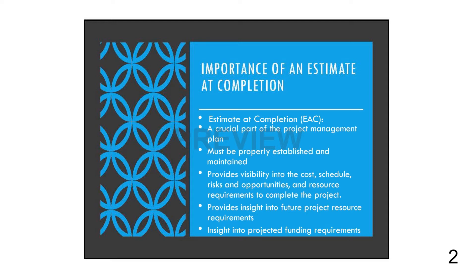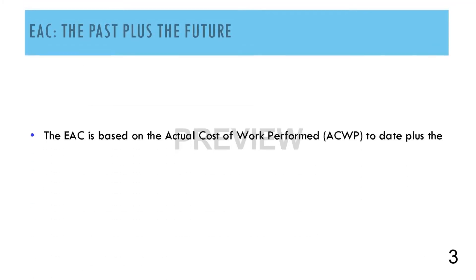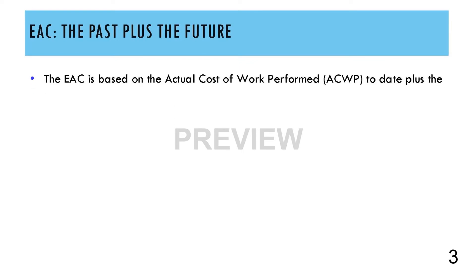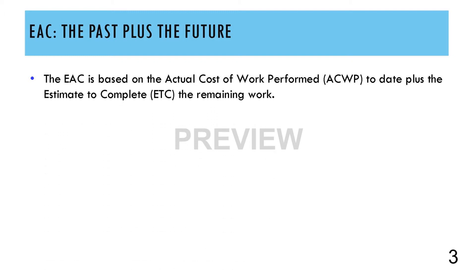The basic formula for any EAC is the actual costs of the work performed, or ACWP — the past — plus the estimated cost to complete the remaining work scope — the future. This is also called the Estimate to Complete, or ETC.